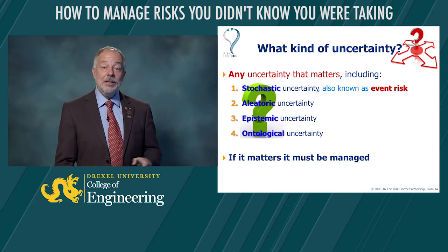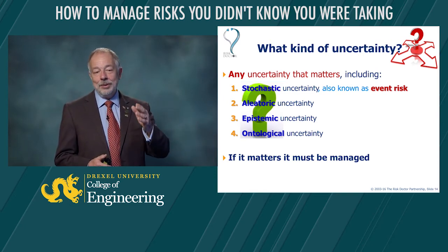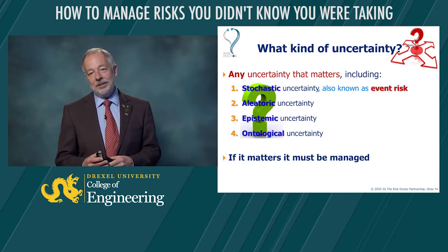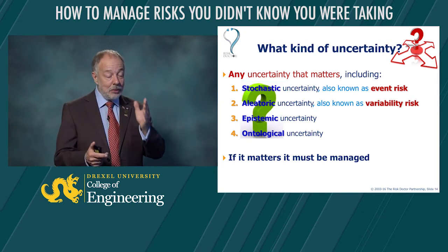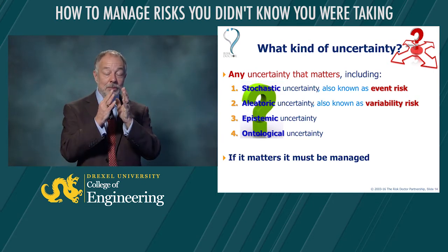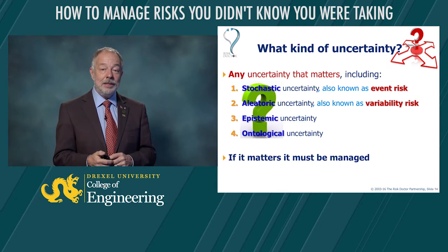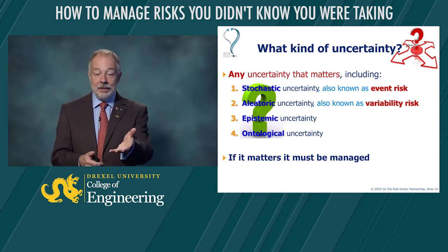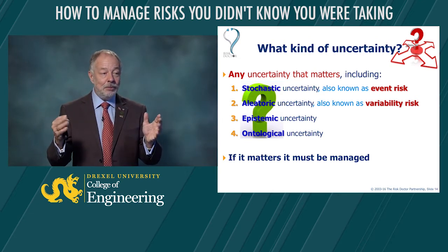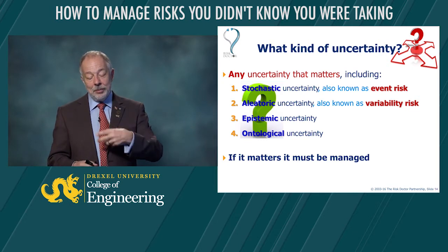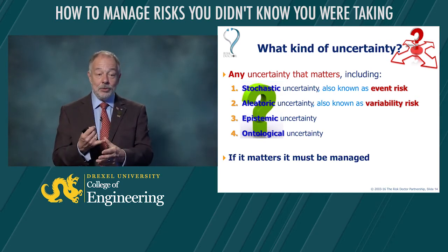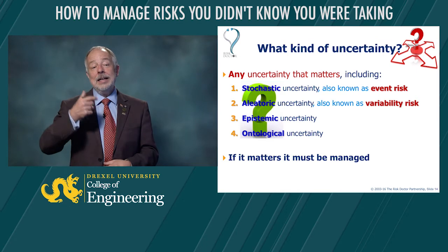Let's try to explain them in ordinary terms. Stochastic uncertainty is event risk — these are the uncertain future events that most of us think of. Stochastic is from a Greek word that just means it happens or it doesn't. Aleatoric uncertainty is when we think about variability. We're going to do something — this is our plan — it could be more or less. So variation on something which we plan to do is aleatoric. It comes from the Latin word for dice — the answer could be one, two, three, four, five, or six. We know what the answer range is; we just don't know precisely what the value will be. So we're going to do a test, and the duration of the test could be one, two, three, four, five, or six weeks — we just don't know exactly how long. That's aleatoric uncertainty.